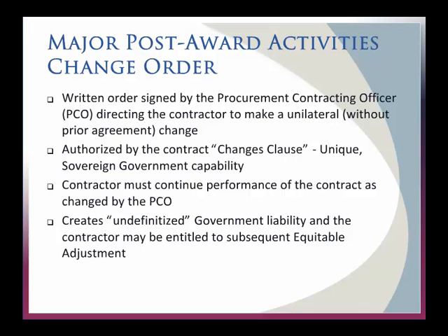So while they have to continue to do what they were doing before, if they said that they were going to do something for $100,000 and now we come in and we say we want to change, we have to negotiate the cost of that change. They have the right to say, hey, if you're not going to put any more money into this, maybe we need to take something that we said we were going to do off because you're going to put something on.